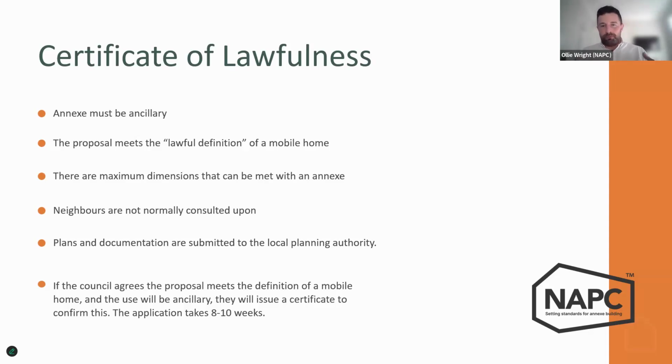As part of the feasibility study at the start of the process, we will usually highlight if we have some concerns that, although it's quite a big residential plot, the curtilage is much tighter around the house because there's other land involved. We will let you know, and we'll say you have to try and keep your mobile home within that area. If you're dead set on using the paddock or the orchard to the rear, then what we would have to do is apply to extend your curtilage into that area.